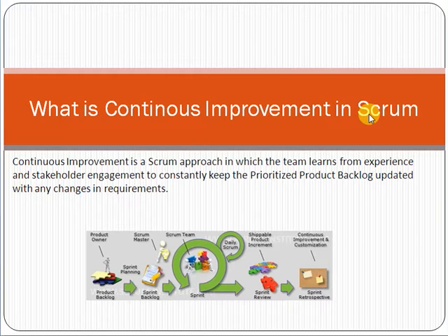Nowadays it is very common, successful and popular, and most companies are moving towards Scrum. Why? Because it's popular, and it's popular because it's successful. The vendors get the feedback of the customer at a very early stage. For example, if we are making an e-commerce solution, after the first sprint, after 3 or 4 weeks of development and delivery, we get the feedback of the customer, and we can know whether we are going in the right direction or the wrong direction.